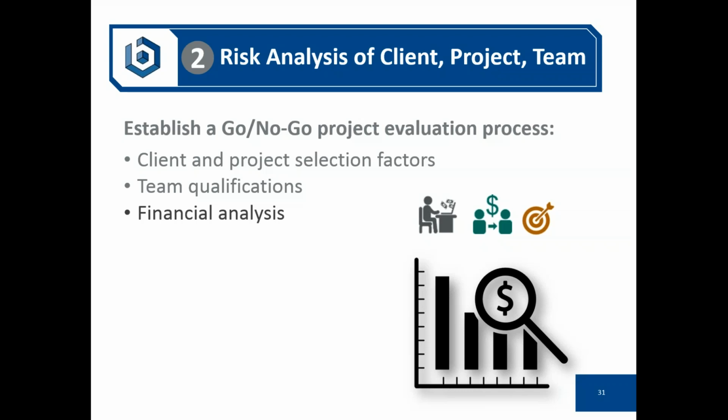Large firms, the very large firms, have their project managers do very detailed financial analyses, project plans, even before they propose their fees. Not just reliance on similar projects that occurred in the past, but really looking at that history plus the specifics of this particular project, and really analyzing and having a much greater degree of confidence that the fees will support the work effort and the profit targets. So this does add to overhead time for those firms, but it is a great discipline to have.